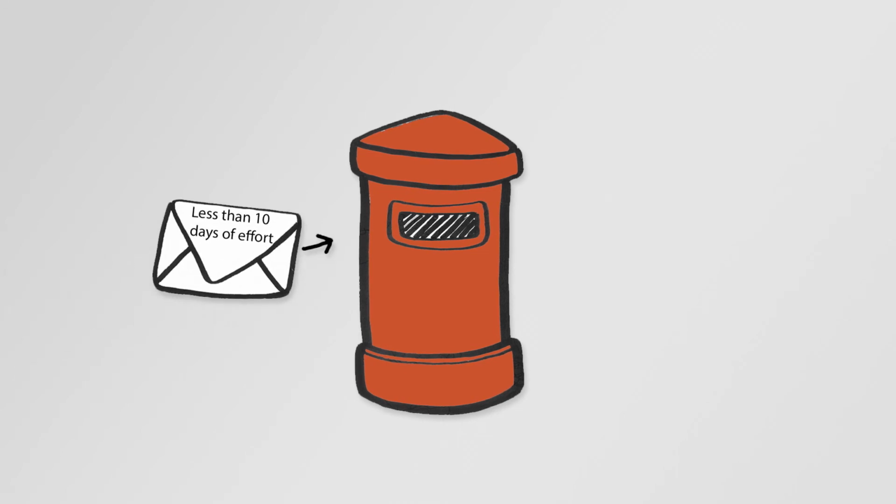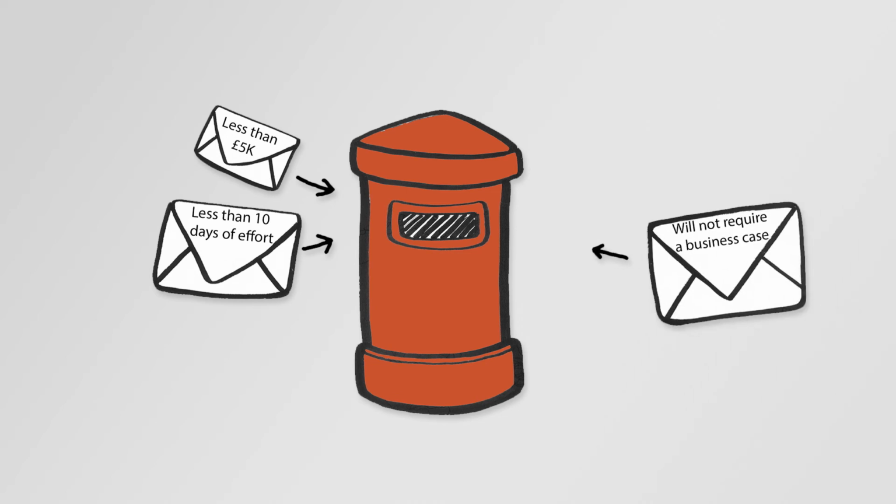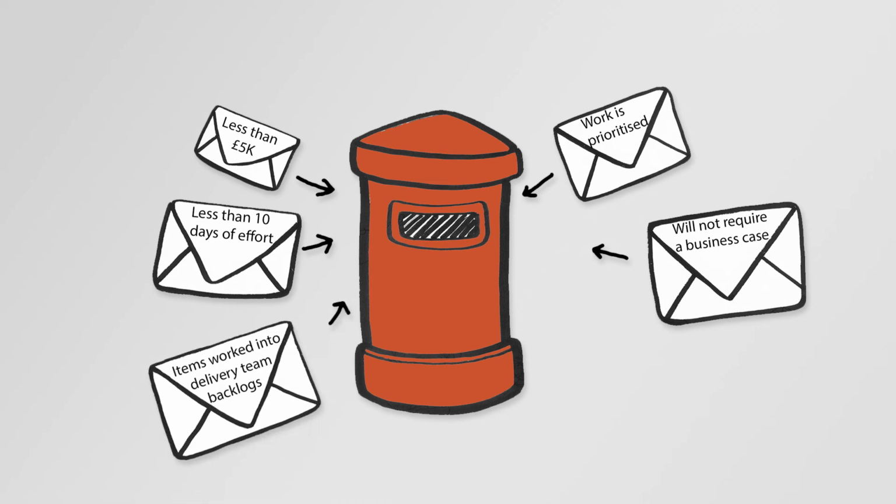The criteria to get this sort of request through is as follows: less than 10 man days, less than 5,000, will not require a business case, work is prioritised, items worked into delivery team backlogs, and equals 10% of the workload.